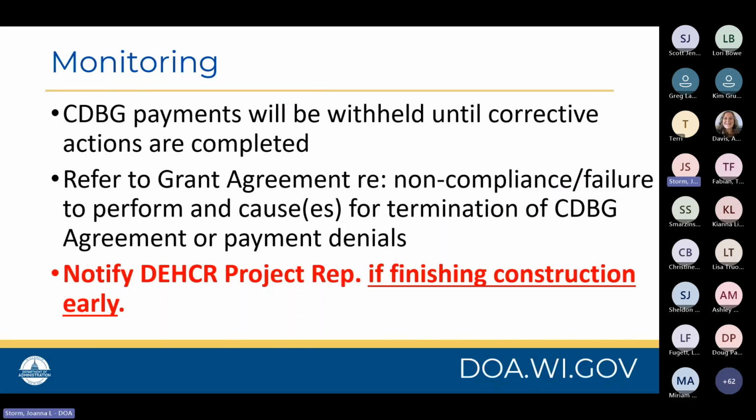Please note that CDBG payments will be withheld or essentially put on hold until any necessary corrective actions are completed. Refer to your grant agreement for the non-compliance and failure to perform clauses and any clauses for termination of the grant agreement or payment denials. Again, I hope everything goes smoothly for you. If your work is on schedule or hopefully ahead of schedule, please make sure to notify your DECR program representative if you anticipate finishing construction early.